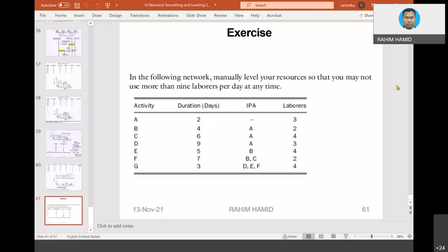If in certain situations we increase the duration of that particular activity, then perhaps it will affect the free float of that activity, and subsequently it could push the subsequent activity. And at the end of the day, those activities which had a free float might not have any free float. They now become critical activities also, within the line.